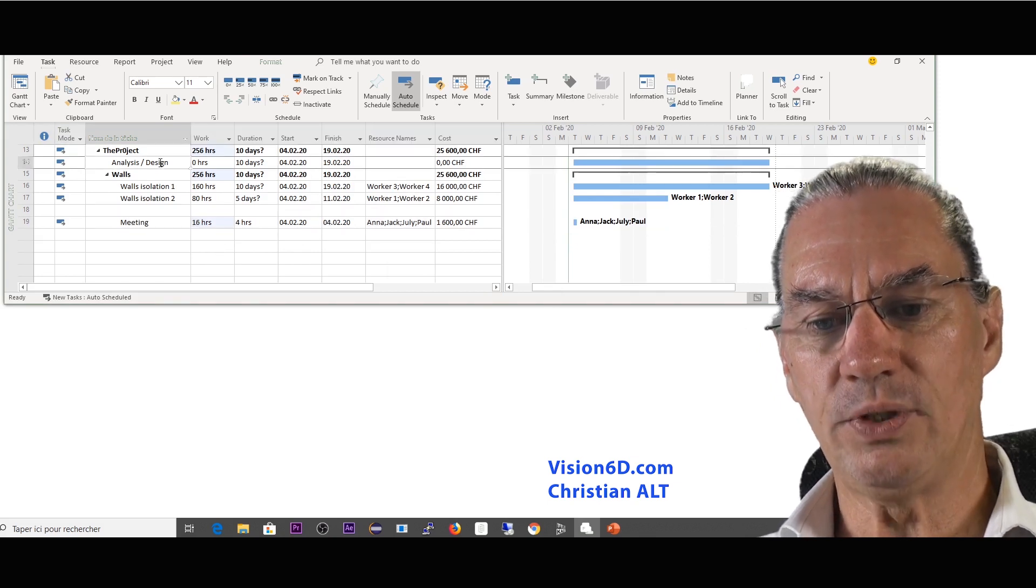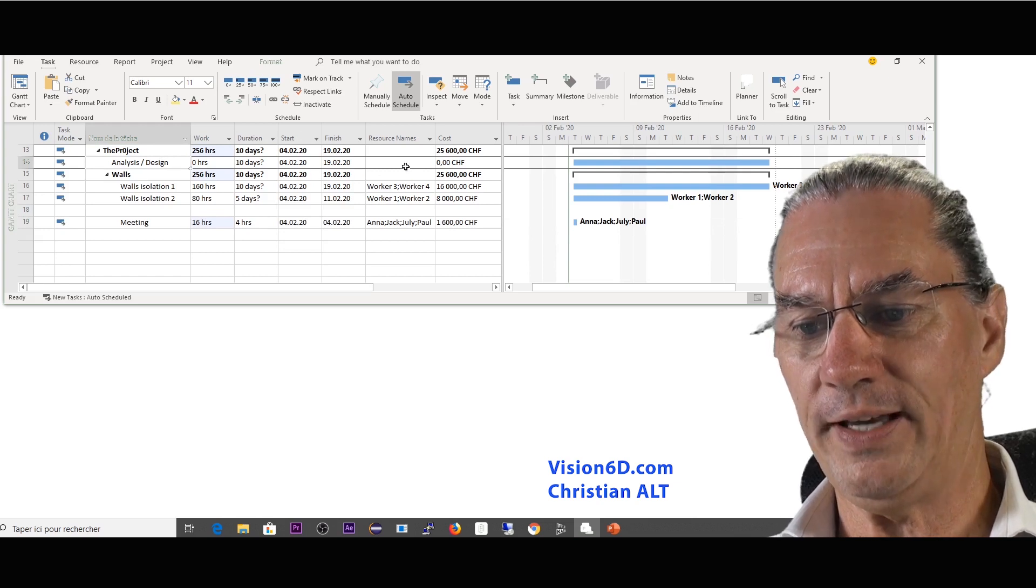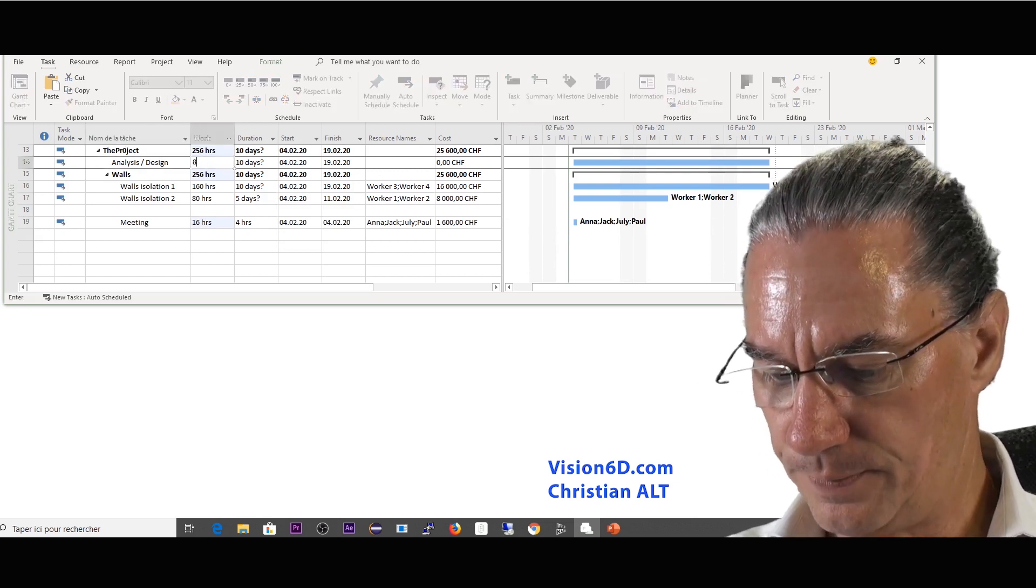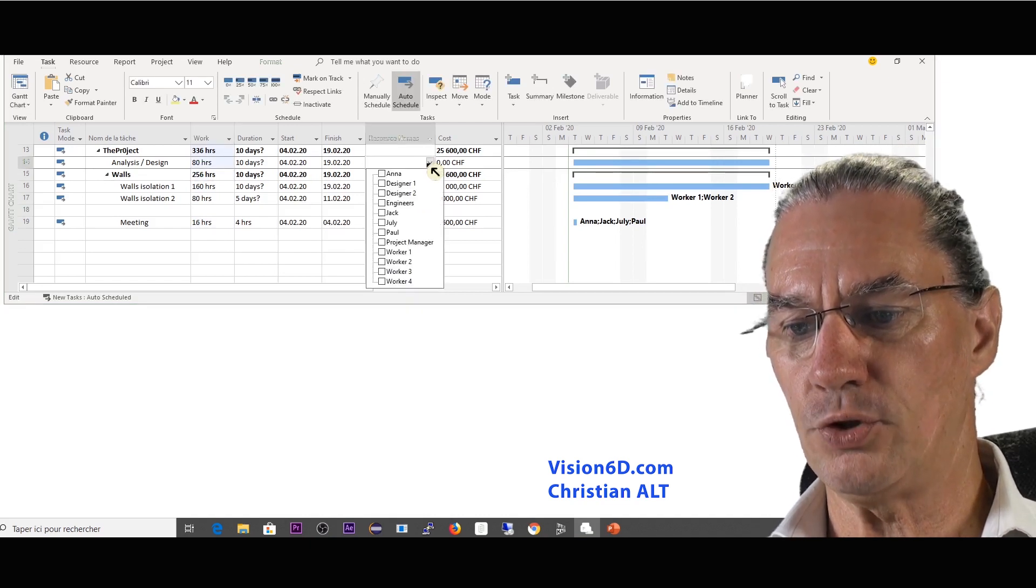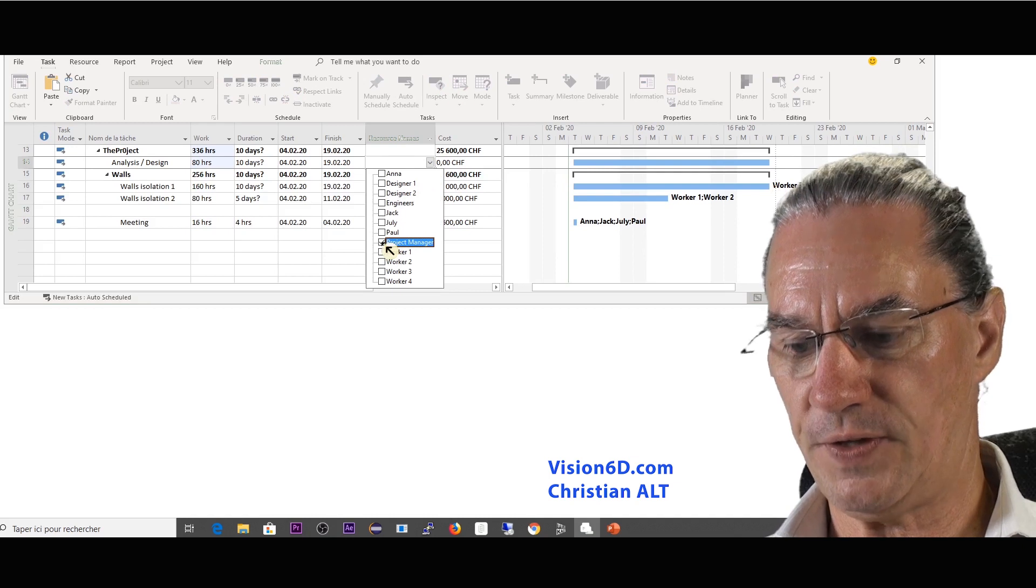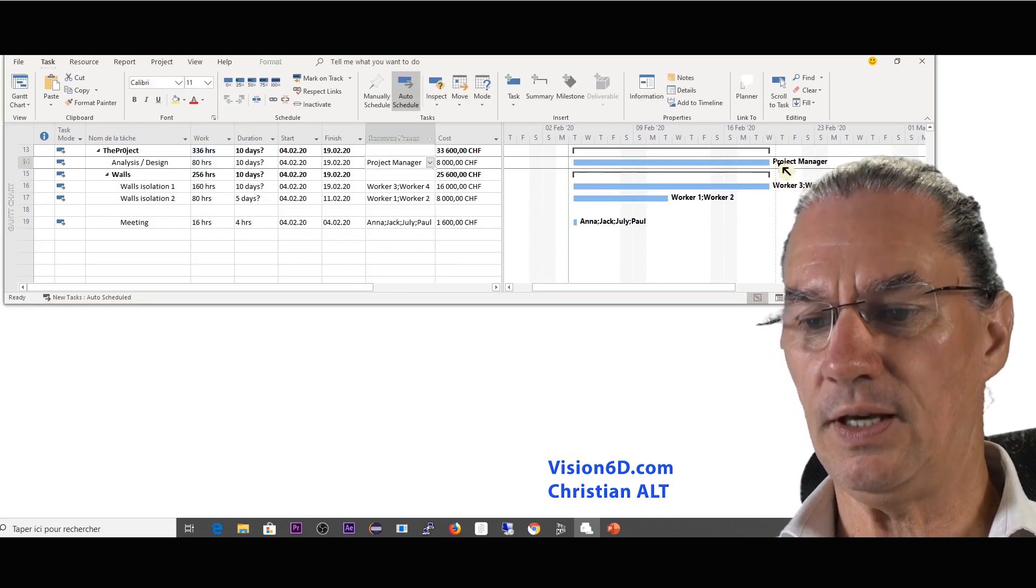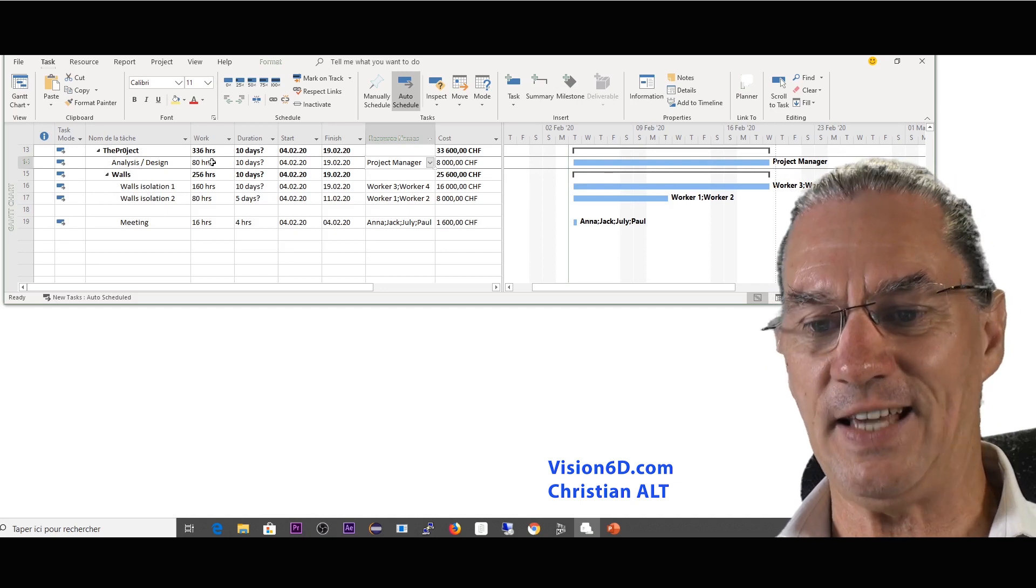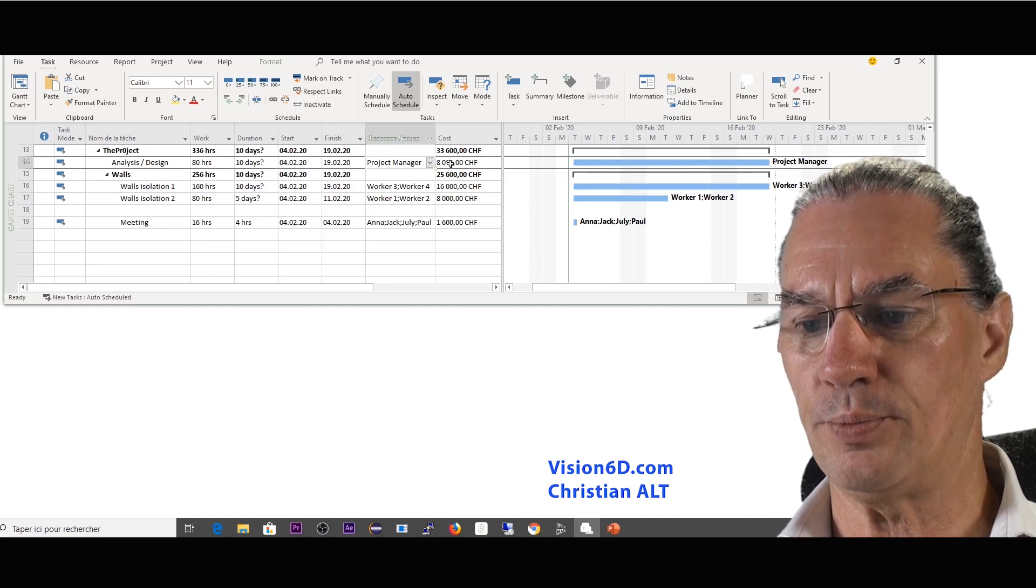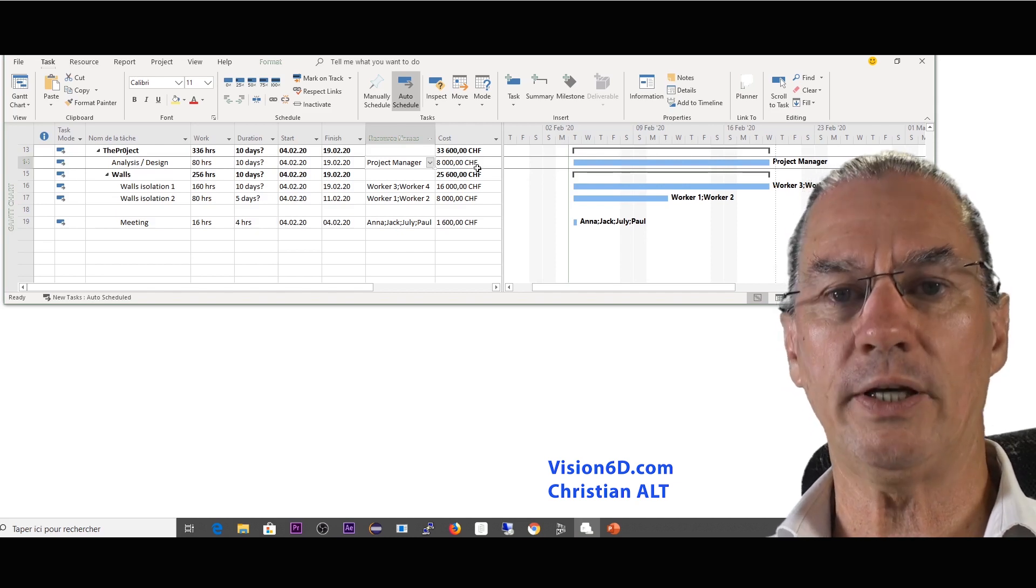So now back to the analysis we had here where it was for 80 hours again and this was done by the project manager. So the project manager is here. So I say we see he will work for two weeks during 10 days so you know it's 80 hours. 80 hours times 100 per hour, it's 8,000 which is absolutely correct.